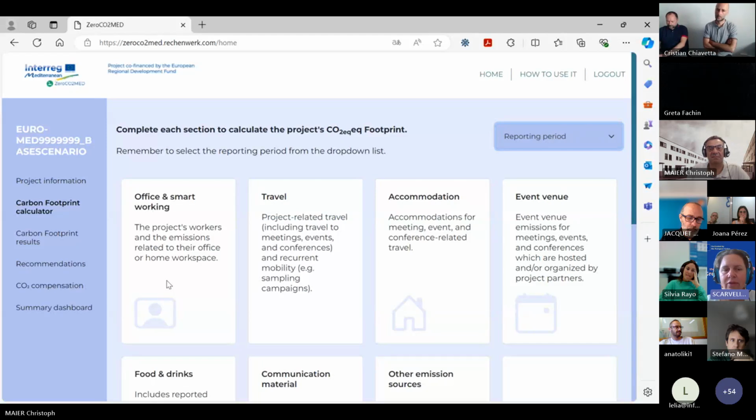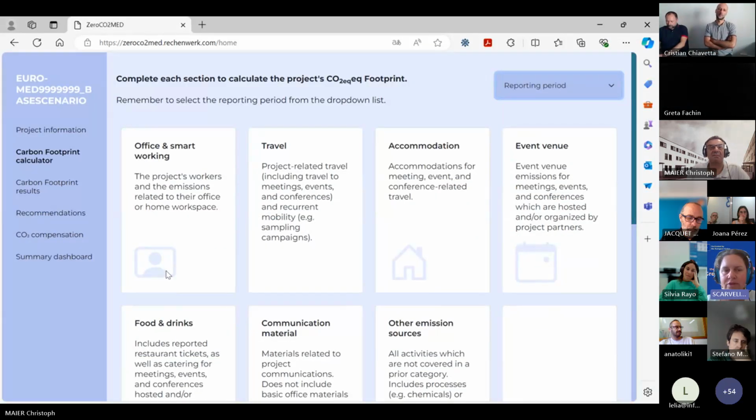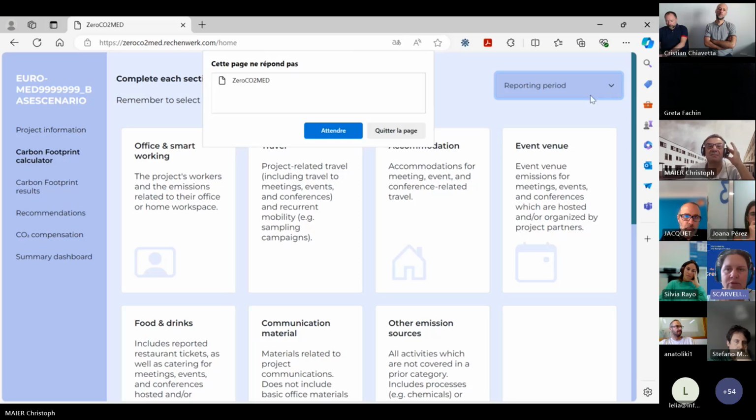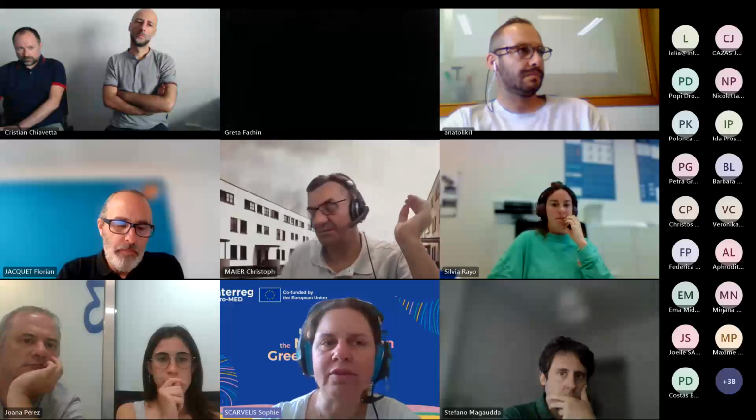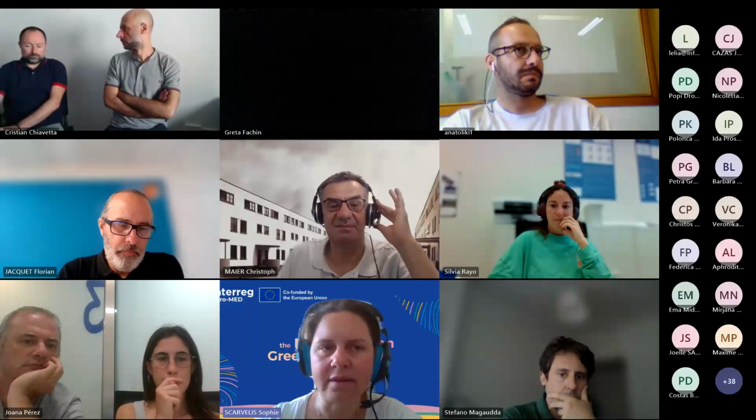And for the staff, the easy thing is to take the same percentage you use to declare expenditure. If you declare 20% of the staff as expenditure, you can use 20% here also. Don't try to modify it. It's the easiest way to go with it.